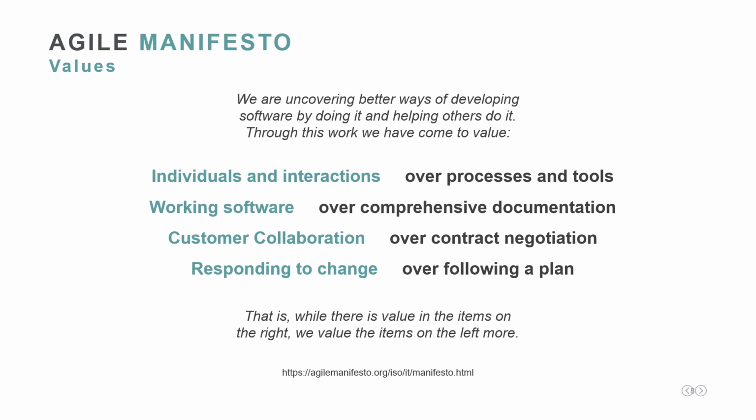In summary, it's a myth that in Agile there is no production of documentation, but Agile favors lean and practical documentation. Another myth is that Agile bans planning. Rather, planning in Agile is for sure performed, but it is not made up front and immutable, but done and revisited continuously in order to better adapt to the changing product and market context. The sprint planning and daily scrums are two examples of Agile planning.